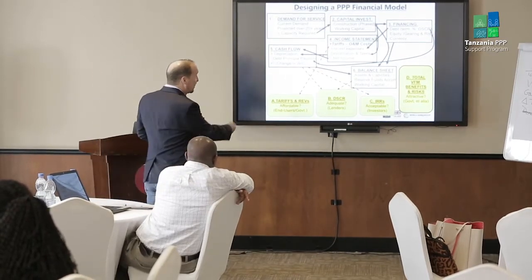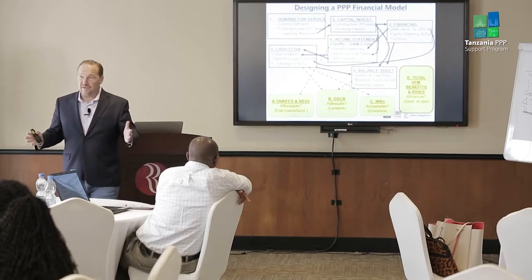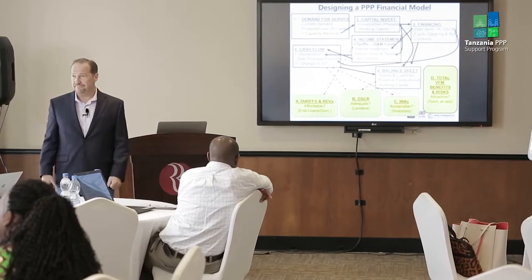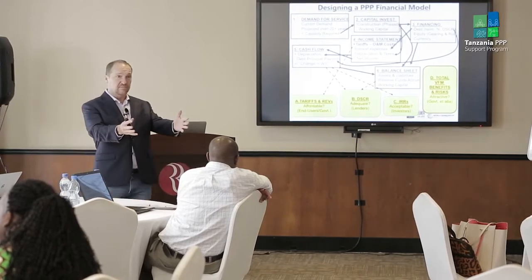Next, we ask the question, okay, if this is the amount of the initial investment and startup, where are we going to get the money? Is it going to come from all equity or equity and debt? And if so, what assumptions should we make about the term we sometimes call the gearing ratio, or the leverage ratio? What will be the ratio of debt to equity? How leveraged will the project be? And we have to make assumptions then about the term of the debt, the interest rate on the debt.